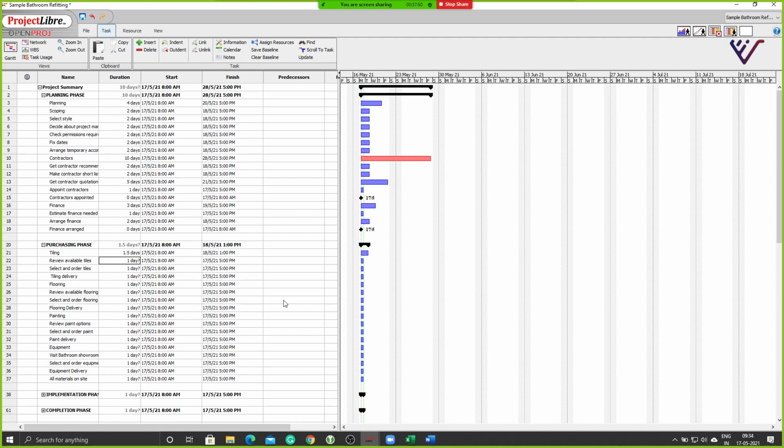You can do that. This 1.5 calculation is coming from my understanding that a day is 8 hours of work according to the program right now. So if you have an activity which takes 4 hours to complete, then I will put it as 0.5.